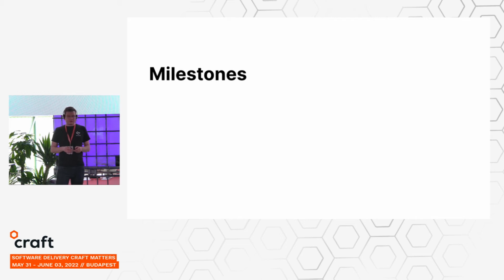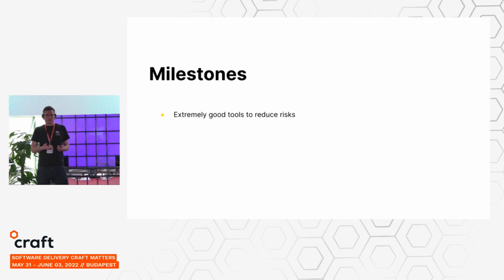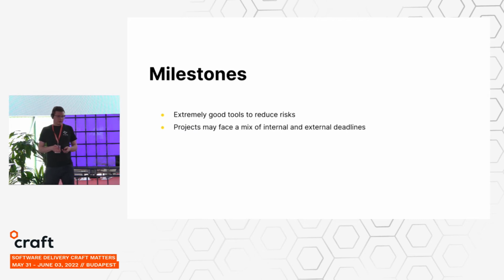And to ship this feature, finally, we had to break it down into smaller milestones. What was the reason for that? This project started with an enormous amount of risks. We didn't have a final scope. We didn't know how exactly we wanted to ship, and we didn't know what sort of team we would have. So milestones help you minimize and reduce risks.